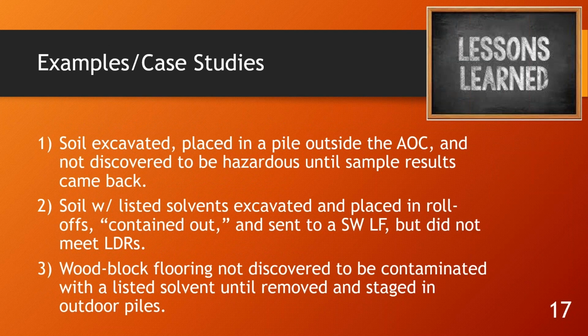If they had tested beforehand, they could have isolated those blocks. But what they did was dig everything up and run it through a chipper, and then test the pile afterwards. And then they ended up with a huge quantity of hazardous material, whereas if they had just paid attention before they did everything, they would have had a much smaller quantity to deal with. So I guess that's another lesson. Just keep all this in mind.